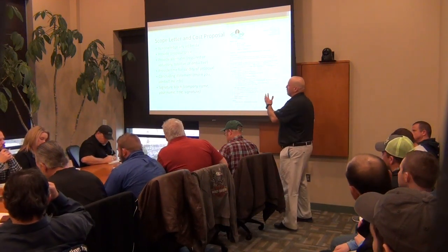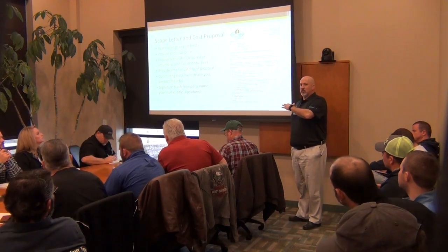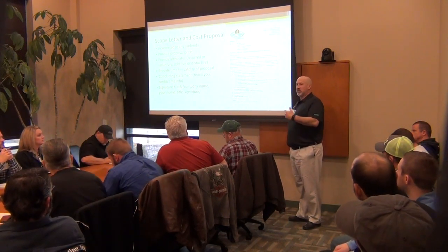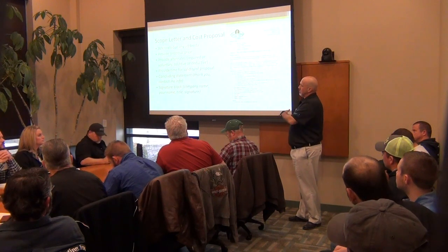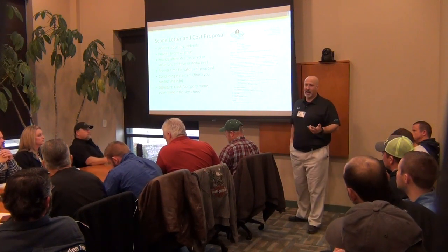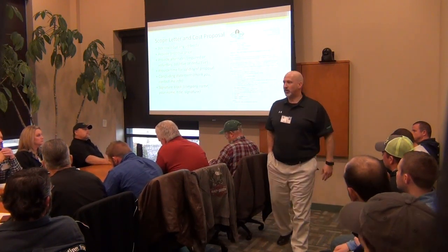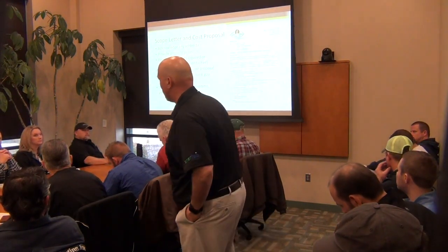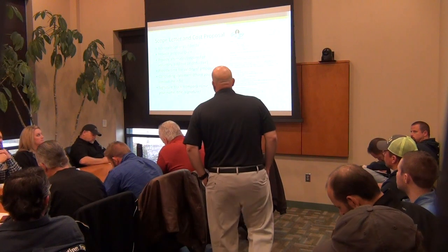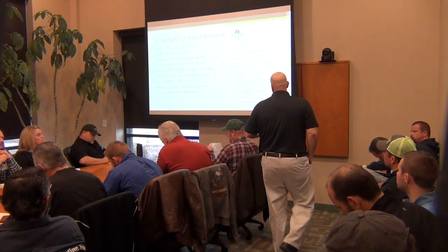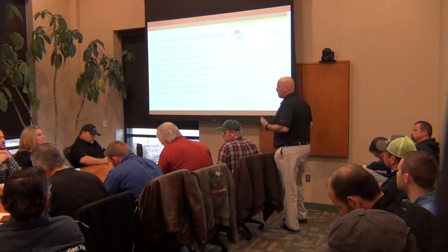But if you exclude a bond or can't bond, let us know. If you exclude it and don't want the cost in your upfront proposal, then give us your bond rate. Right? Include that in your proposal. To me, it just saves me time, because I'm going to call you anyway. So save us the time, save yourself the time, and just offer it up. If you have the capability, offer it up.